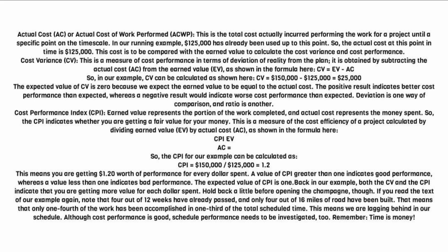CV equals $150,000 minus $125,000 equals $25,000. The expected value of CV is 0 because we expect the earned value to be equal to the actual cost.